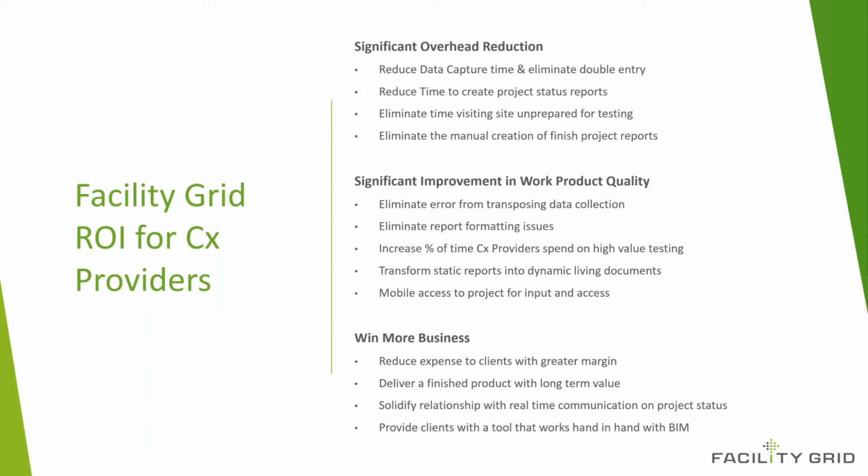So this could be a status reporting or progress reporting, or maybe you need to develop some reports that have to go into LEED submission, for example, right? Your LEED facilitator may be looking for specific reports, specific documents that are required to be submitted for LEED certification. And obviously, the most important report is which comes out of the end of the project, and which is the part of the turnover, and these are your typical final commissioning reports and the systems manual.